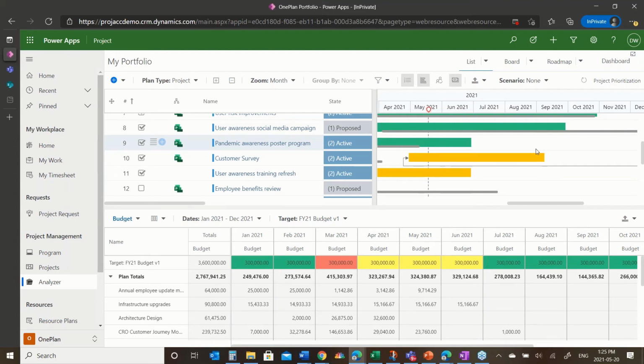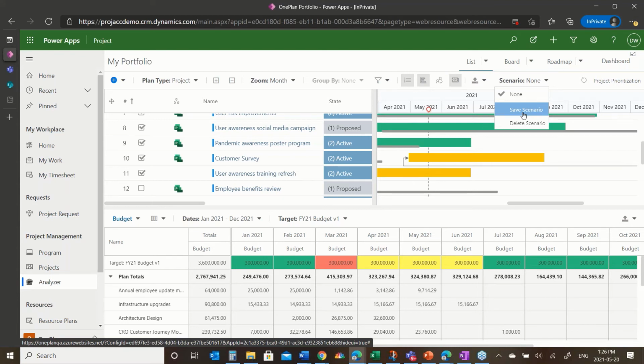I didn't change the total, but I've now changed when and where the money should occur based on a shift in that particular schedule to see if that doesn't take advantage of some of the green months over here and move us away from the problem area. And I could continue to move that around. And when I'm done, I save it. Save scenario. Say, that's today's, we're looking at V1 of the budget, so this is V1 of the model maybe, and we would continue in that way.